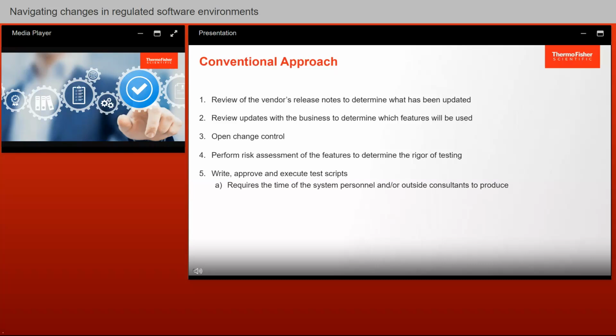which costs money, right? And then after that's done, you make sure you update the procedures that guide you how to use the application, and you verify the effectiveness of the same procedures through user acceptance testing. So you take the actual user, the actual procedure, and you run that through the process and make sure you get the outputs as designed. And if not, you figure out what the issue is, whether it's part of the procedure or part of the configuration that didn't work out correctly. Once everything is correct, you close the change control.